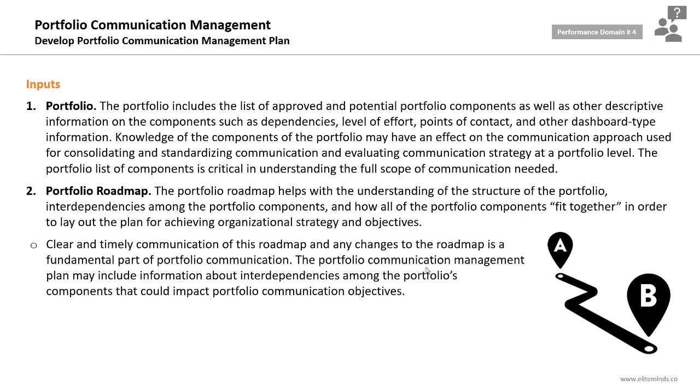Clear and timely communication of this roadmap and any changes to the roadmap is a fundamental part of the portfolio communication. Why? Because the portfolio communication management plan may include information about interdependencies among the portfolio's components that could impact portfolio communication objectives. So the up-to-date portfolio roadmap will serve as a very important input while you are planning for the portfolio communication. Any change to the interdependencies, any change to the timelines of the portfolio components might trigger a need to change or update the portfolio communication.